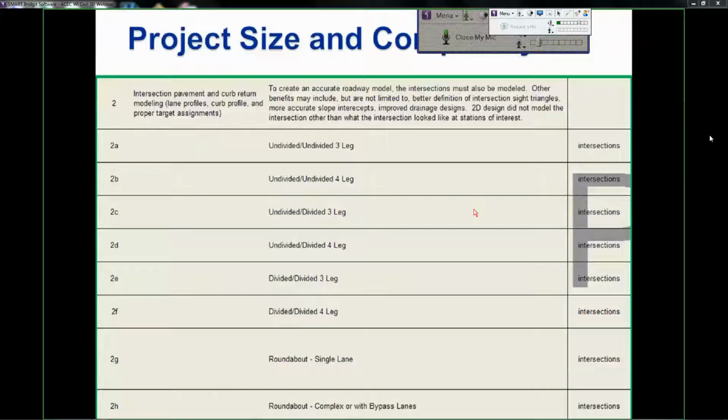That's what they represent. So the department, this was a technical report. We didn't develop any policy here. We just gathered information, all right? And then we brought it to the policymakers within the department, and Bureau of Project Development made a decision on how to use this information. And the instructions that are being given to Wisconsin DOT project managers are to negotiate design contracts to the low end of these estimate values. That's the department's policy.